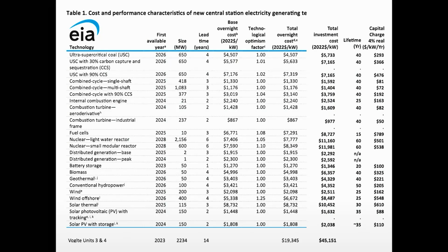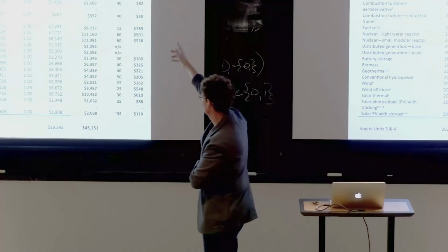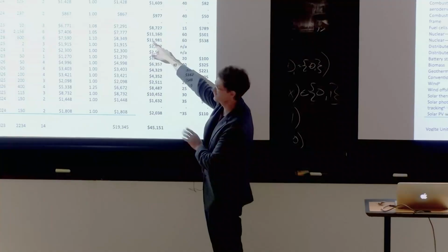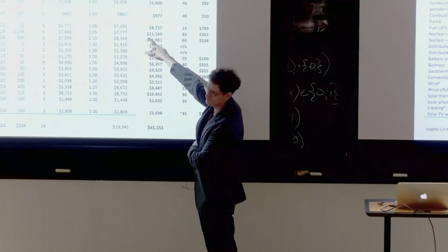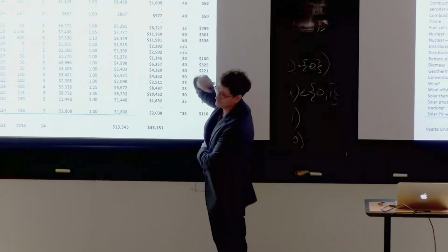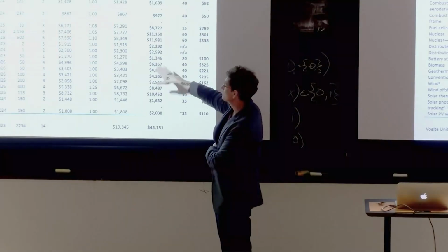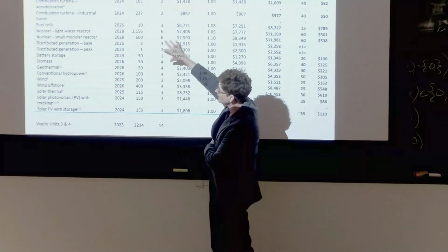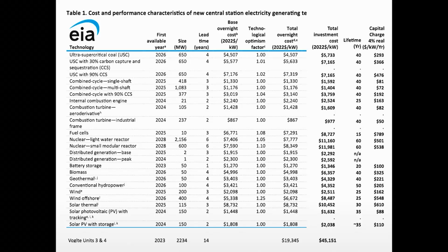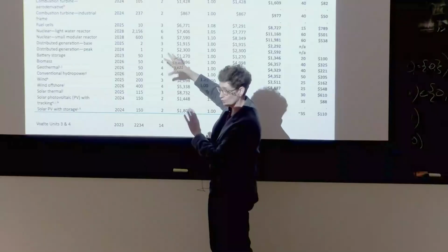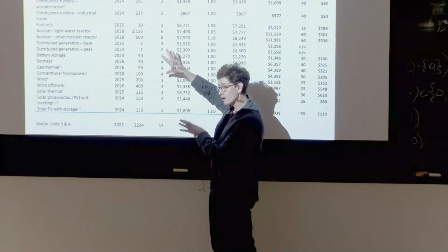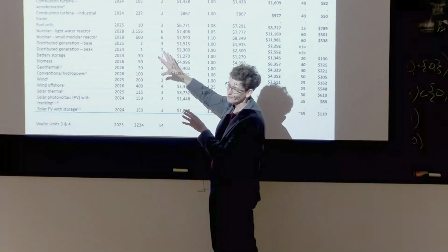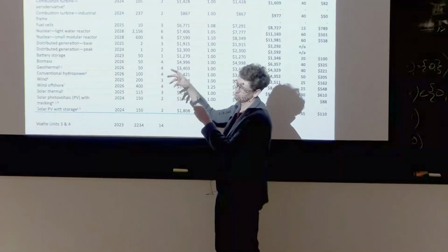There's your answer. Top line, $300 to build a coal plant. And for the nuclear plant, I mean, this is the loan payment. So this is if you would just want the total investment cost, $11,000 per kilowatt of capacity versus $5,000, about twice. Okay. Now, remember, this is assuming these EIA numbers, which we've seen in the spectrum for the overnight costs. There's a whole range. These numbers are bigger than the vendor estimates, but quite a bit smaller than what we saw for Vogtle. So these are like vendor estimate plus the contingency.